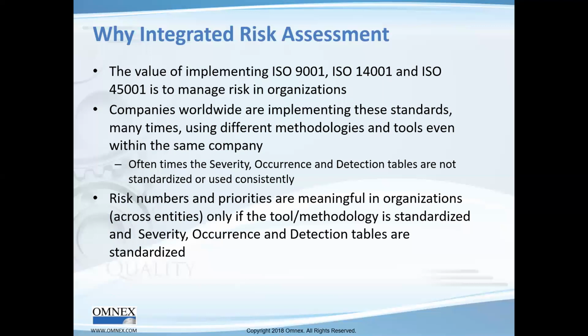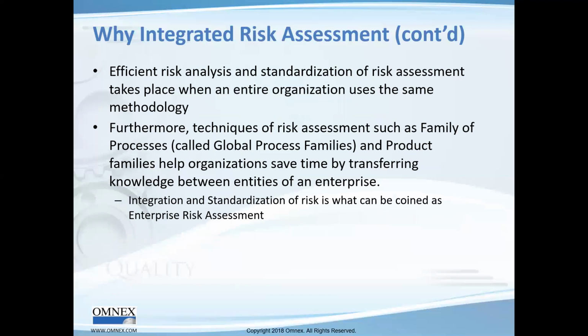Their tables for severity, occurrence, and if they use it, detection, are not standardized or even consistent among the organization. Consequently, the risk numbers and prioritizations are not meaningful. They're only meaningful if the tools and methodology are standardized and the tables are standardized. So efficient risk analysis and standardization of the risk assessment takes place when the entire organization uses the same methodology and tables. Furthermore, techniques of assessment such as family of processes or product families, inheritance can help organizations save time by transferring the knowledge between entities within an enterprise. So integration and standardization of risk is what can be coined as enterprise risk assessment.